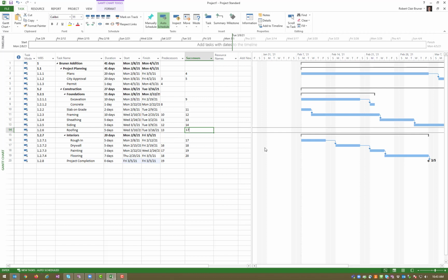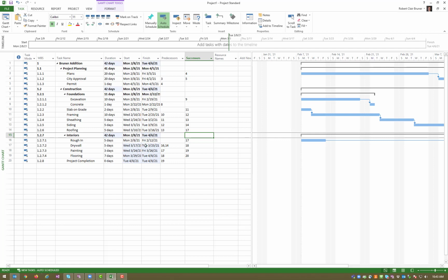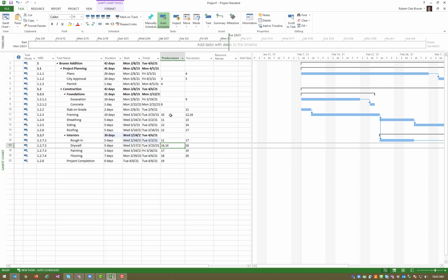So we're going to make that 17, but we still need a predecessor for rough-in. And so I'm going to say that we need to have framing done before we start our rough-in. So that's 12. I'm sorry, that's 11. So we're going to throw that in there.